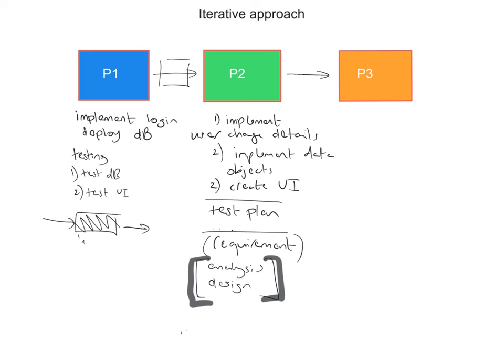Now a question then becomes, well, how many prototypes do I do, or what's the length of time between doing these prototypes? And there's no easy answer to that because it really depends on the nature of your project. If you're doing a classic software project such as building a web application, it may be fairly easy to decide regular prototypes which say maybe occur every 2 or 3 weeks, or longer. Maybe you may do one a month or something for your project, and that's because the flow is reasonably easy. There aren't that many problems to solve.